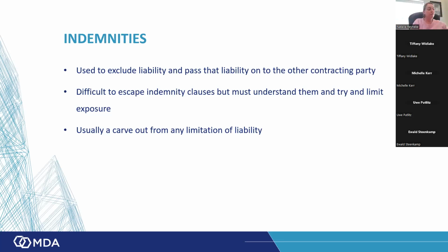If the employer, for example, caused the loss, and I'm talking about a common law link because of causation, but there's an indemnity provided by the contractor in terms of that loss, then the third party who has the claim would only have a claim against the indemnified, because there's no tie to the indemnifier. And then the indemnified would have to seek recourse from the indemnifier.